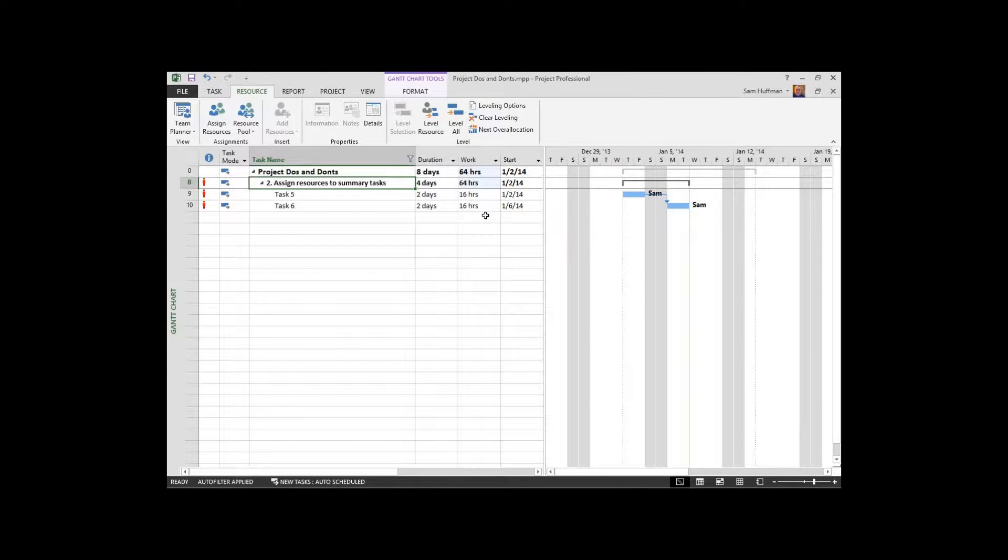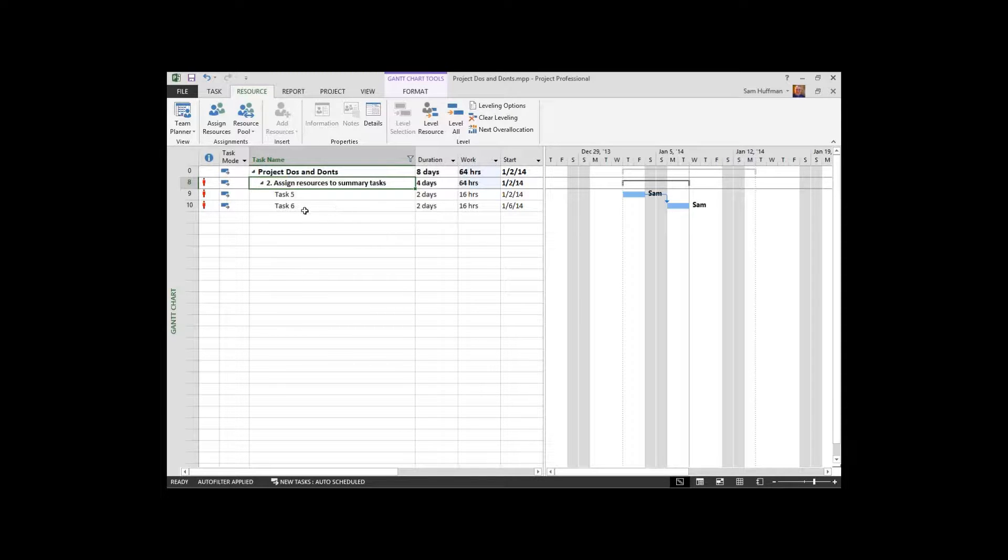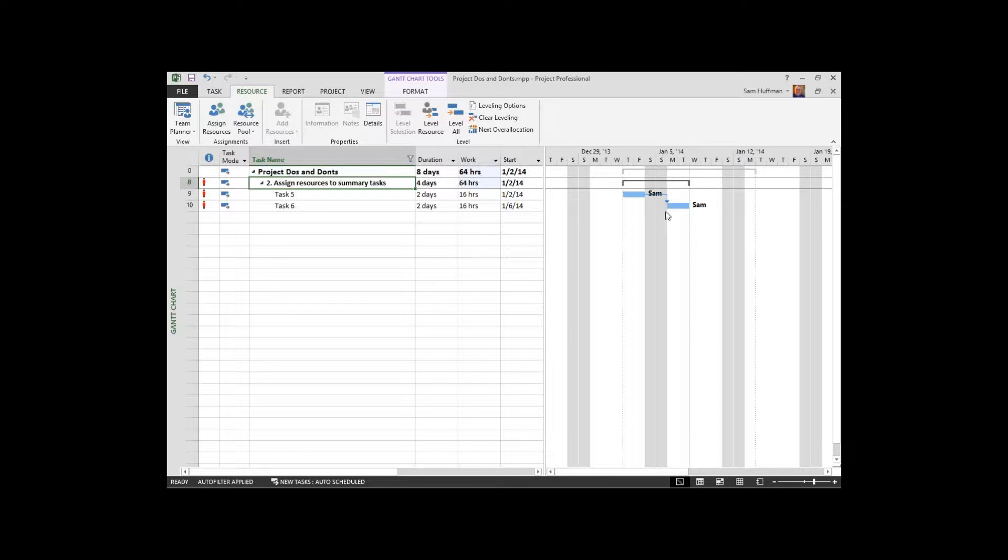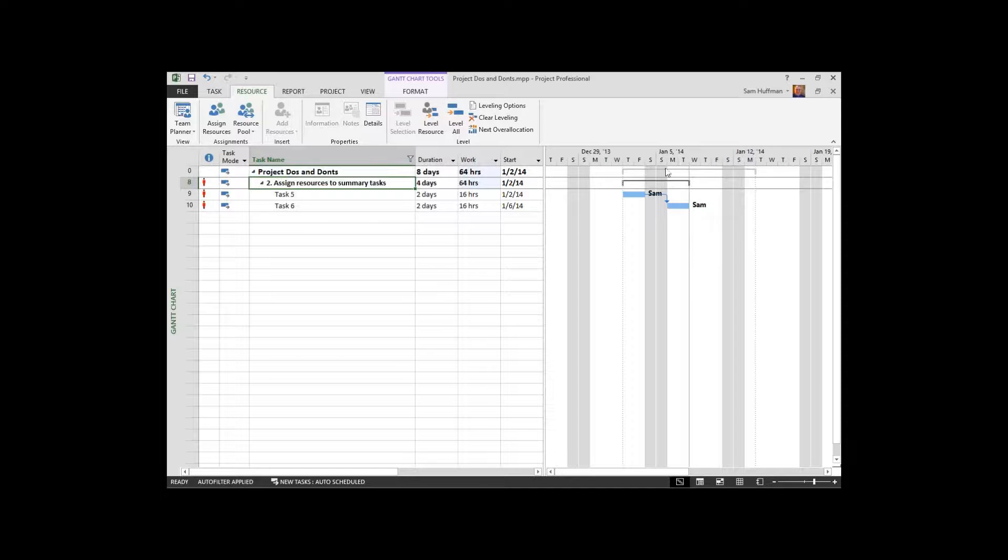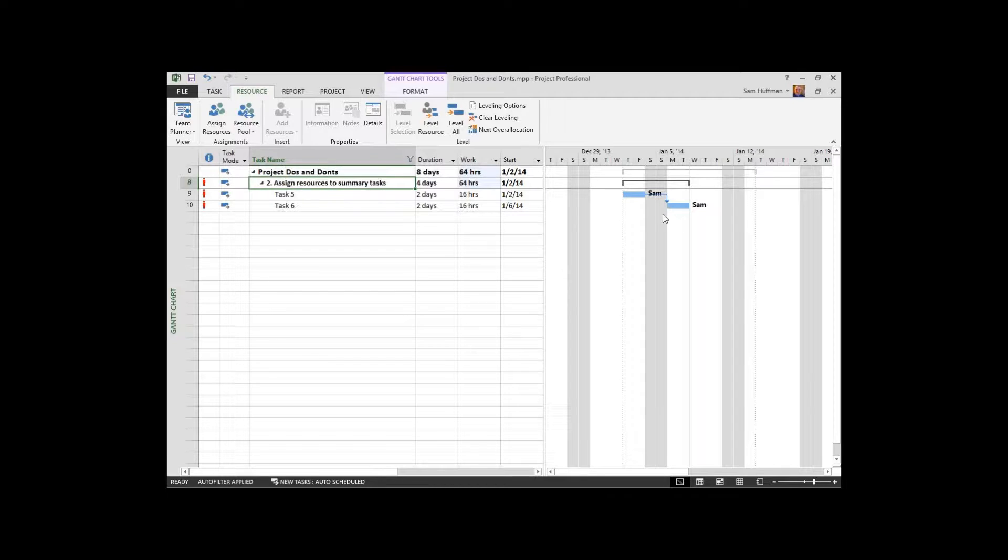If we were to try to resolve this problem, that's a process called leveling in this tool, project would try to delay activities until that over-allocation was reduced. In this case, because the tasks are within the summary, it cannot be resolved.